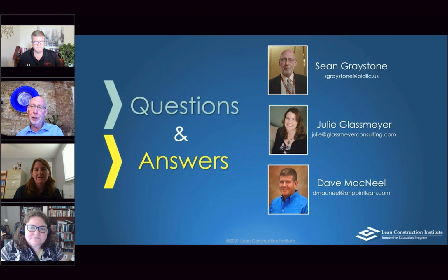It's really well said. I should also say that there are 3 slides in 3 of the Lean Construction Institute presentations: business case for Lean, intro to Lean, and Lean in Design, all of which have the same slide, which basically shows without a doubt we have factual evidence of the fact that the longer into the design and production process of a project that you implement the change, the more expensive it'll be. The earlier that you implement it with more parties involved, the less expensive it'll be, and how it lays out. So I mean, that's a direct corollary, and that's not debatable.